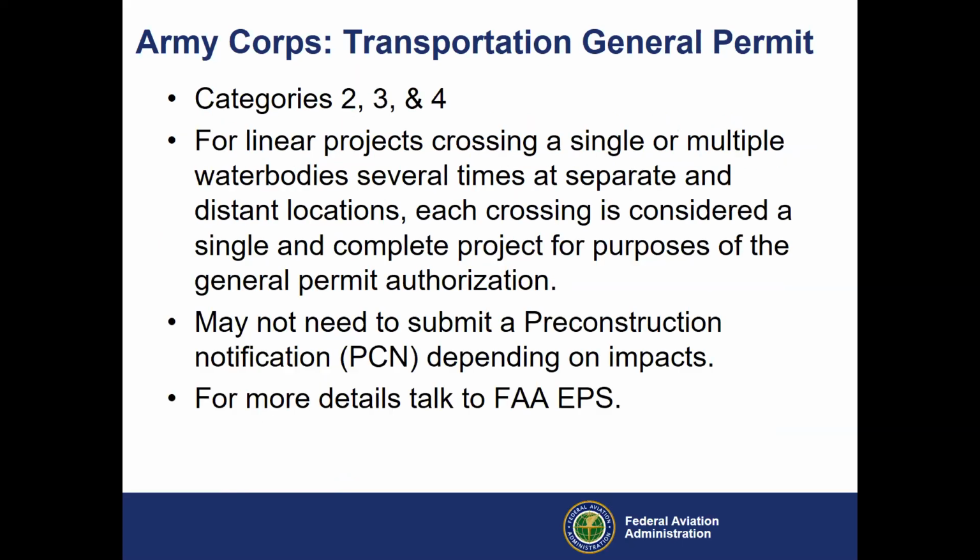Here's some of the categories if you want to read it further. A simple Google search of St. Paul District and then the Transportation General Permit will get you there. I don't want to get into too much of the weeds, but the third bullet there, submitting a pre-construction notification, a PCN, you may not even have to alert the Corps if impacts are low enough. I think the permit talks about a 1/10 of an acre threshold roughly. And of course, you'd alert us. And so if you kind of stay within that threshold, we wouldn't even have to alert the Corps. We would, of course, capture it in our own NEPA document, maybe a documented CAT-X. So again, a useful tool.